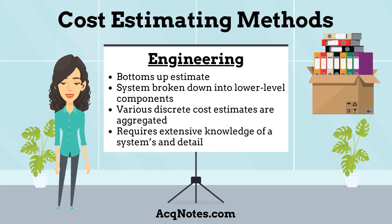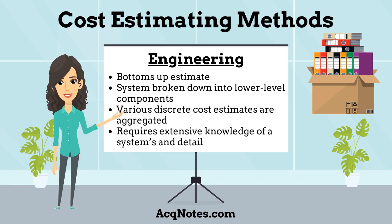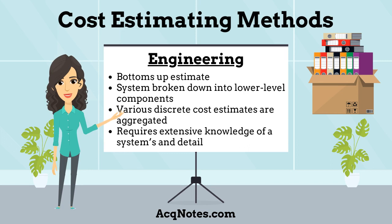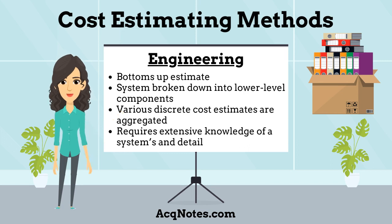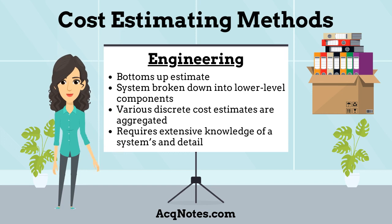The third cost estimating method is the engineering cost estimating method, also called the bottoms-up method. This method breaks down a system being costed into lower level components, such as parts or assemblies, each of which is costed separately for direct labor, direct material, and other costs.